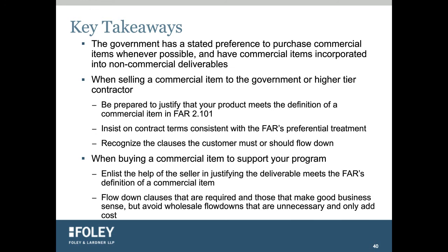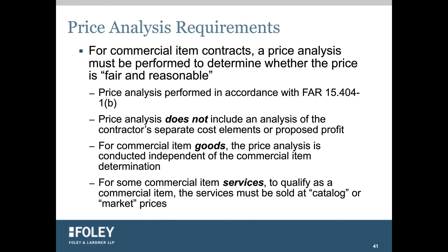I'm going to touch briefly on price analyses, because, as I mentioned, with commercial item goods it's first a commercial item determination, but you still have the price analysis that is required. A price analysis is an analysis of your price without looking at your individual cost and profit elements. In terms of doing a price analysis, either by the government or a prime contractor, the preference is to first look at competition. What are the proposed prices in response to a solicitation?